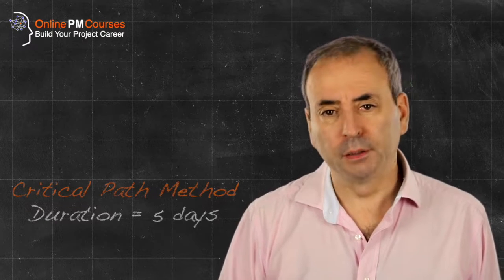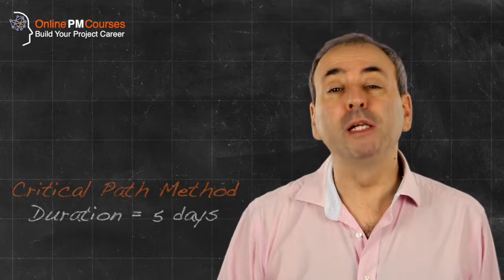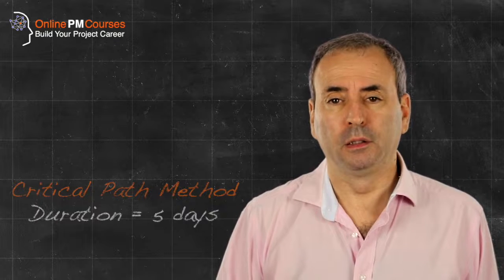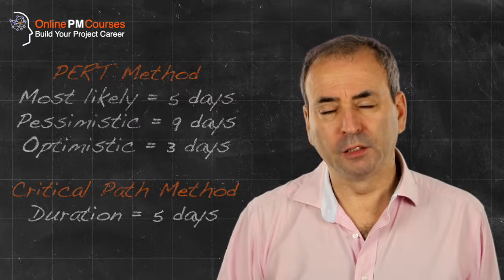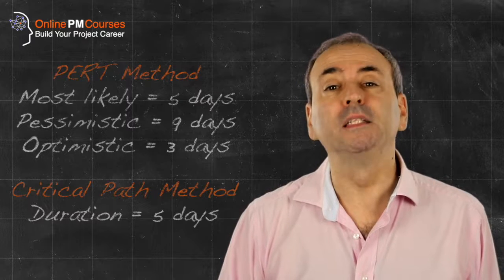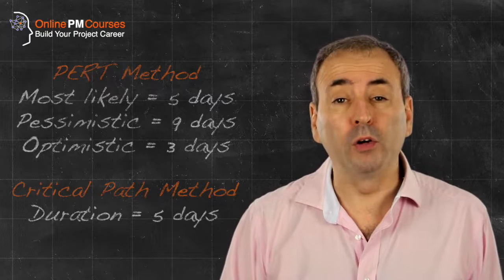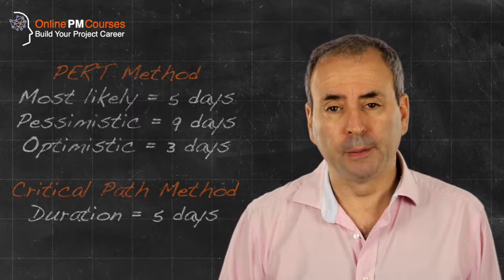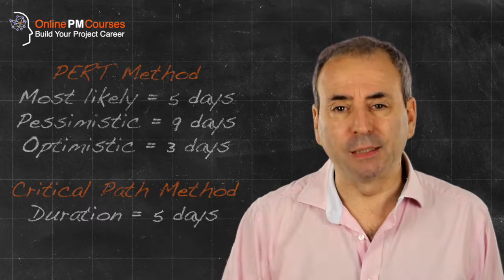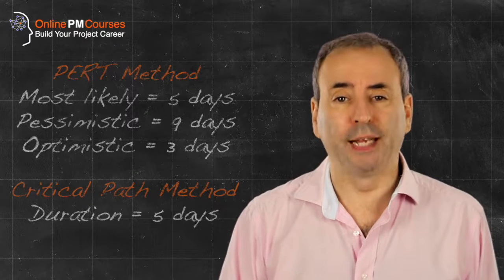In PERT we actually use a three point estimate for every duration. So we estimate what we consider to be the most likely duration, which is the estimate that would have gone into the critical path method. But we also make a pessimistic estimate and an optimistic estimate.